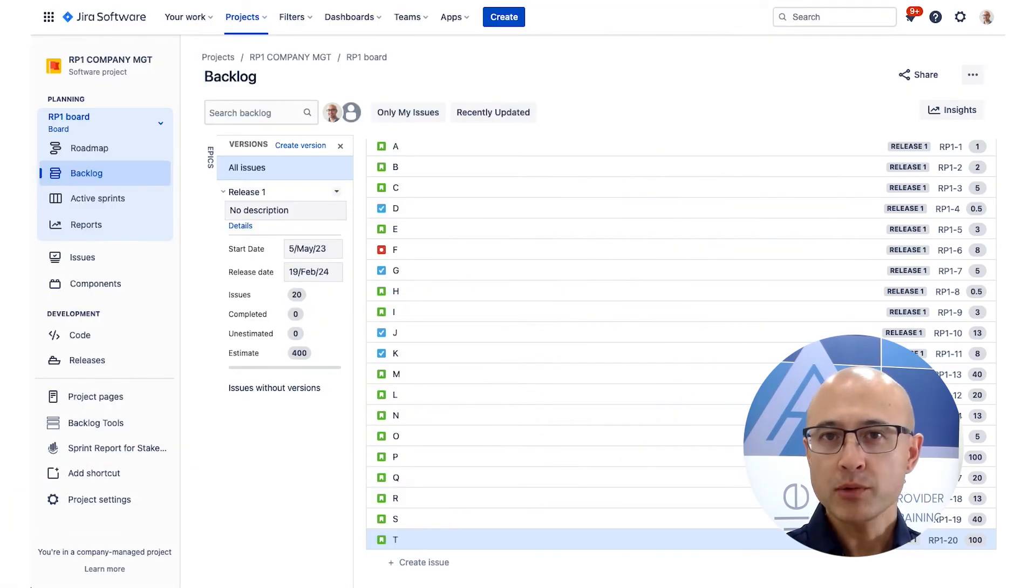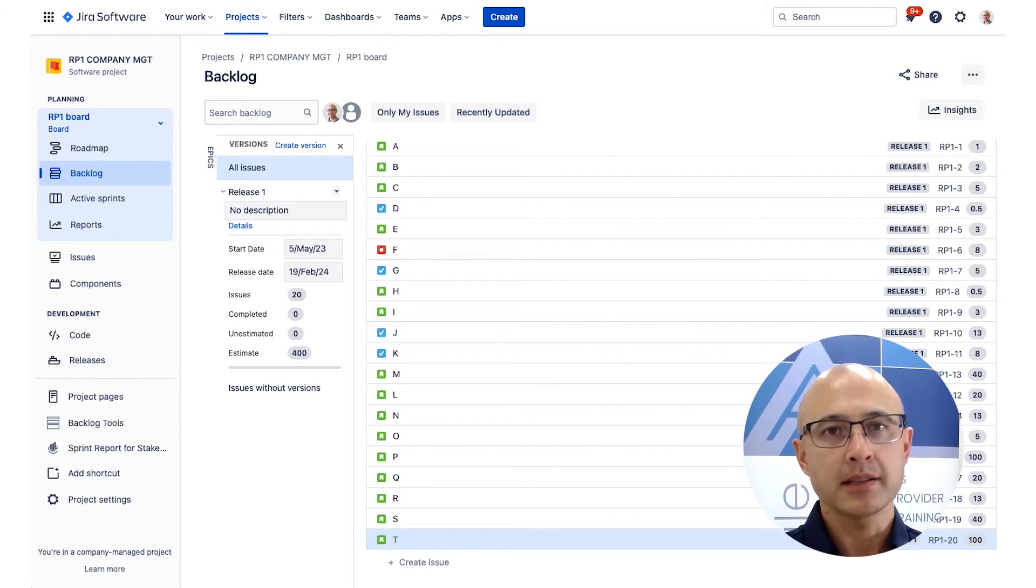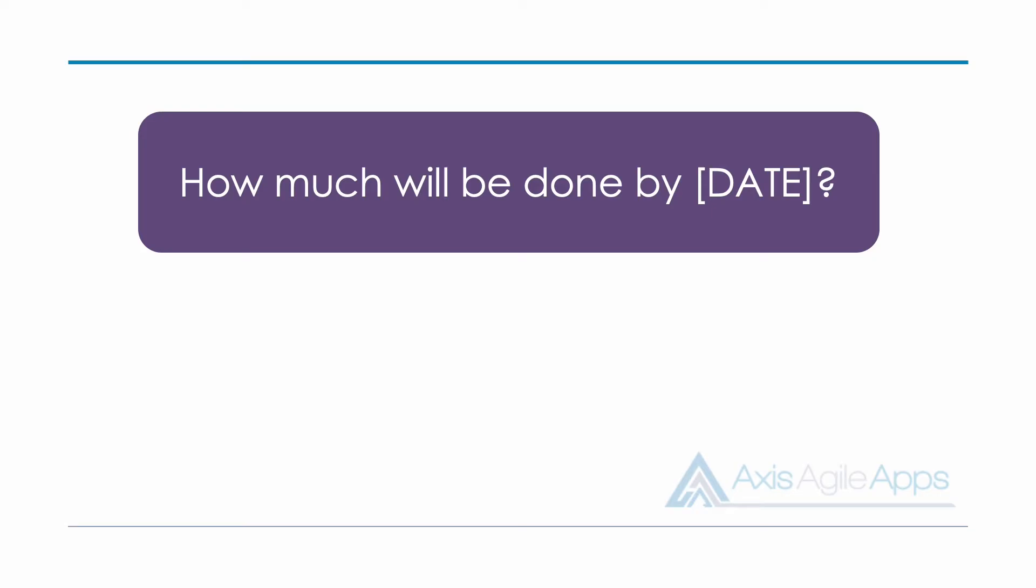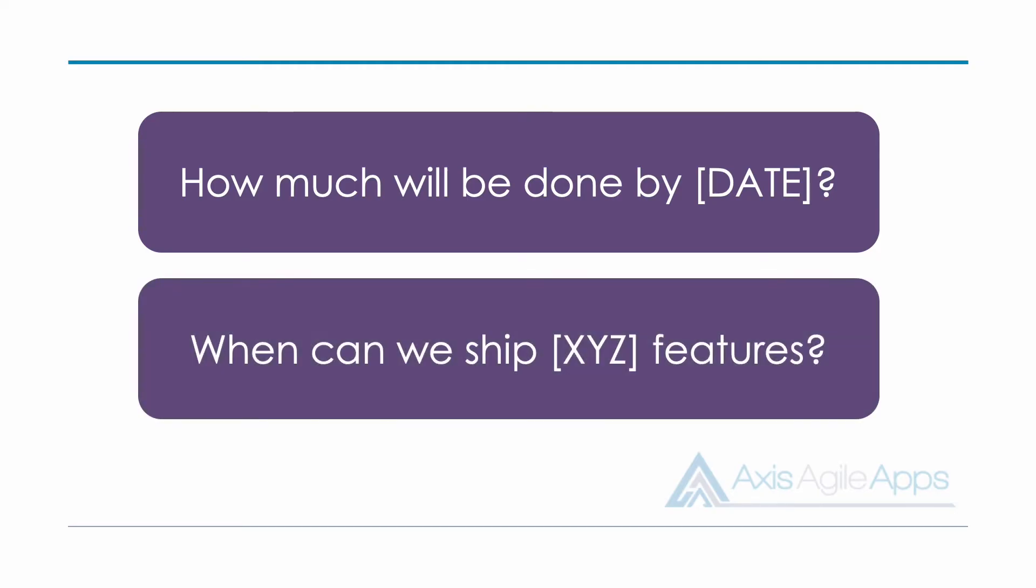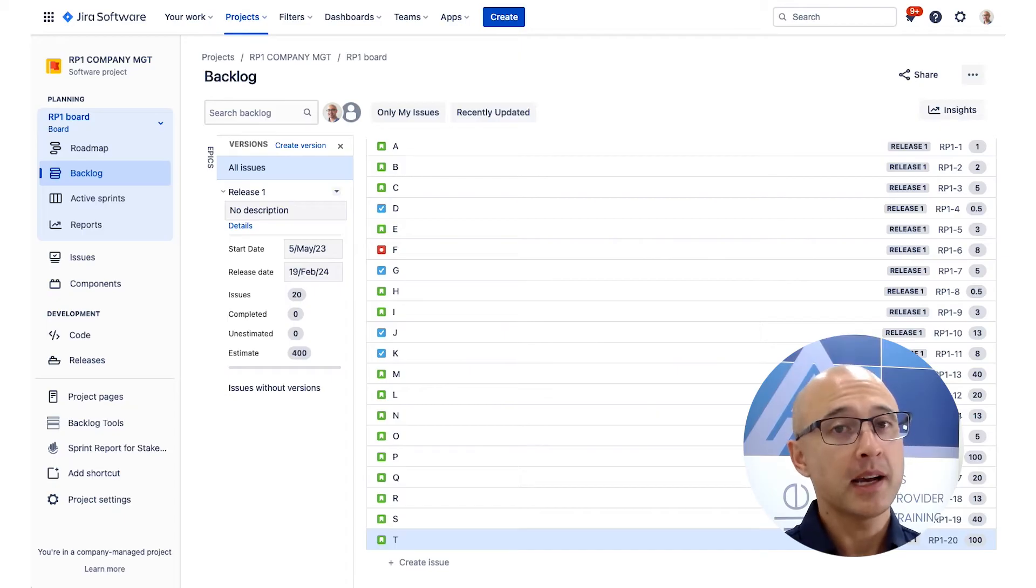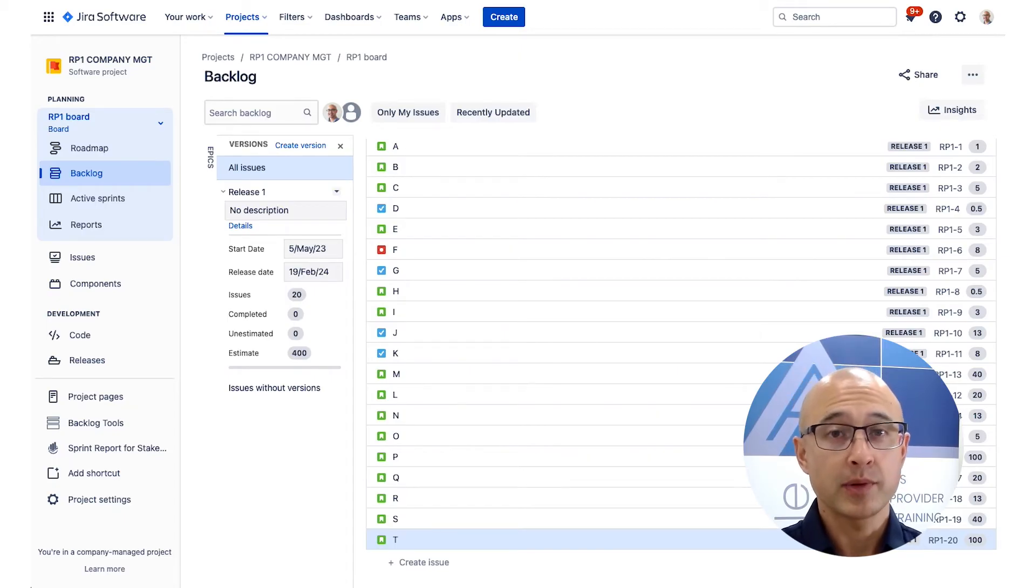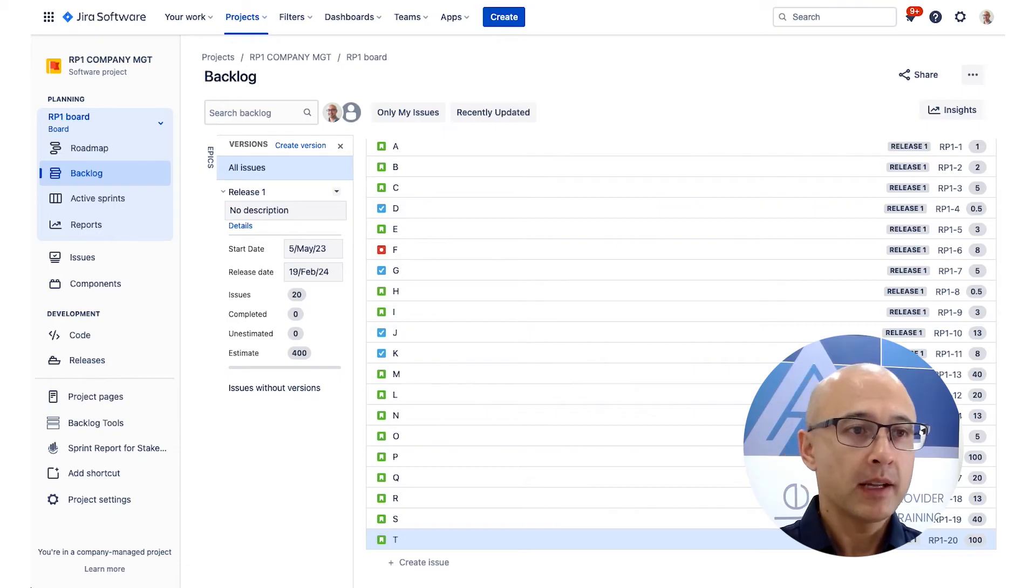When it comes to release planning with story points and velocity, we can actually answer two types of release-based questions. Firstly, we can answer a time-based release question, or in other words, what's going to be done by a certain date. Or secondly, we could answer a scope-based release question, or how long will it take for these certain set of product backlog items to be done by. So let's look at an example of each, and I'll start with the scope-based release question.